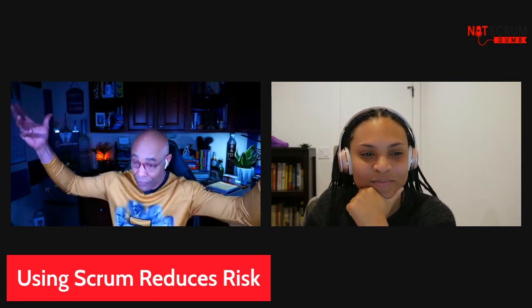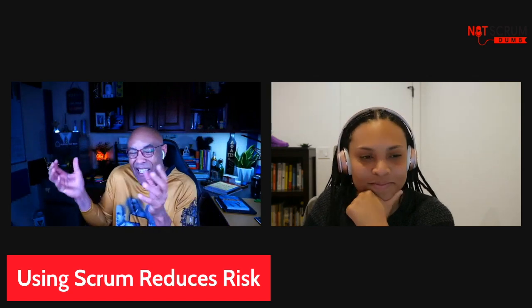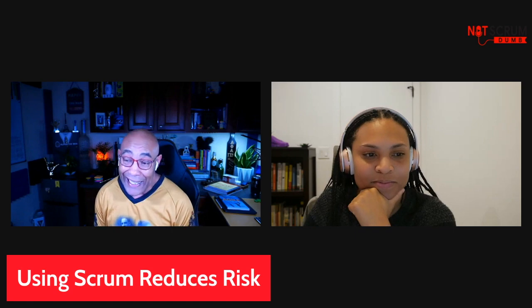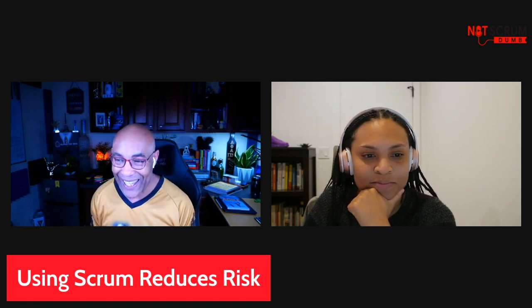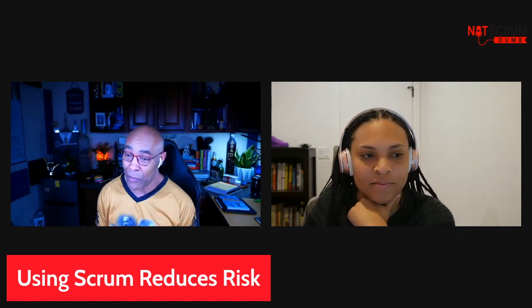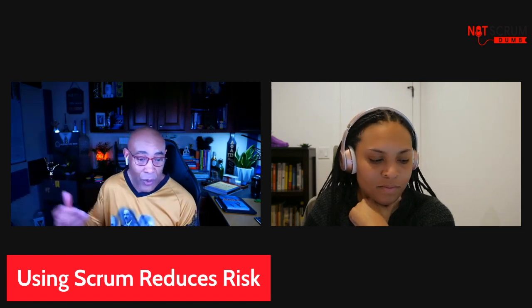Risk management is not clearly defined in Scrum, not like it is in the PMP, which both you and I have. So yes, we had our risk management plan, but it's kind of subtle in the Scrum Guide. It's not hidden, but it's baked into the cake, so to speak. We call that empiricism. Empiricism means we make decisions based upon what is known. That is good for the complex domain that we're working in.